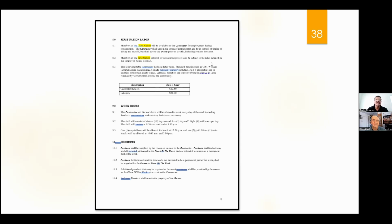The other thing you need is a builder's risk policy. We asked earlier what happens if the thing burns down halfway through? Well, one of the parties better have a builder's risk insurance policy. Builder's risk insures the losses during construction of the particular building. The liability covers third parties from damages; the builder's risk provides for insuring the property under construction while it's under construction.